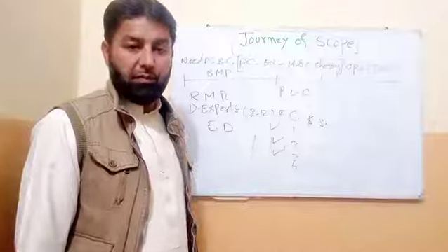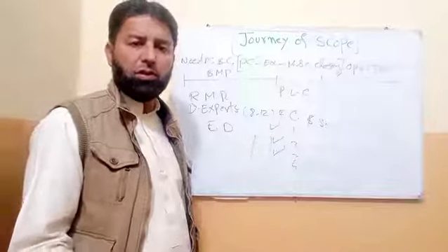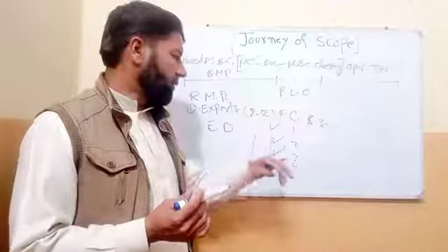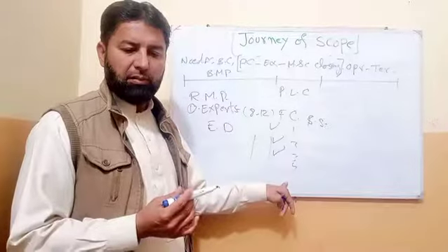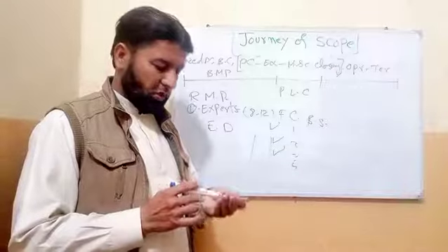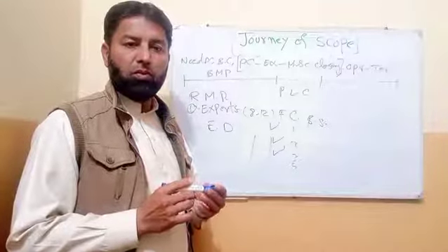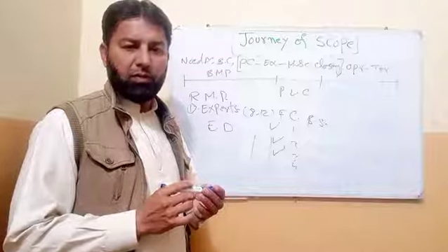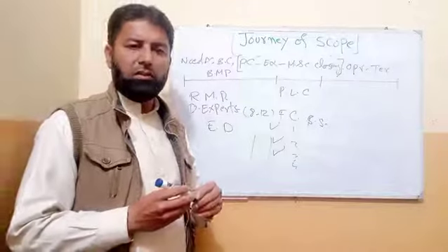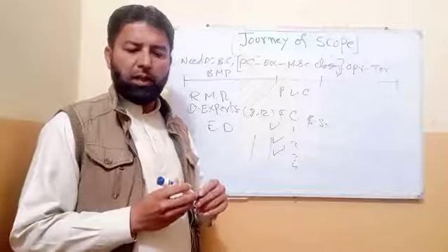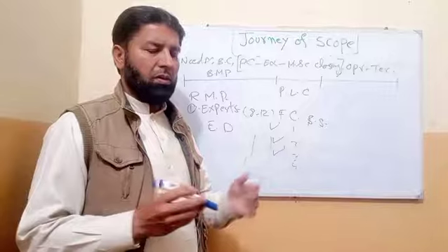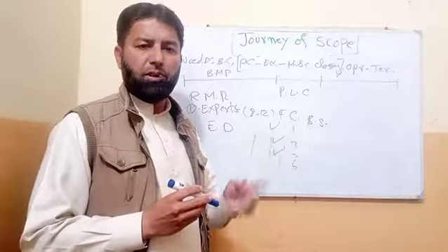And benchmarking. We mostly use it in quality, but we can use it here also to adopt the best requirement. When the audience is large and we want the requirements very soon, we use questionnaires and surveys. We write the questions on paper and give them out, and like this we get the requirements very soon. And interview: we use interviews to get confidential information out from people.